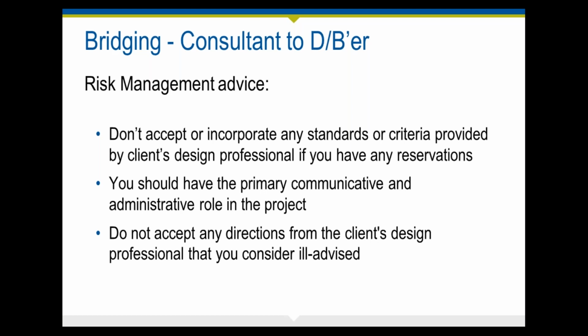During the construction phase, the design builder's design firm should probably have the primary and perhaps exclusive communication and administrative role in the project, especially with the contractor. I think it's important that the client's independent design professional should have no project status other than as an advisor to the client.